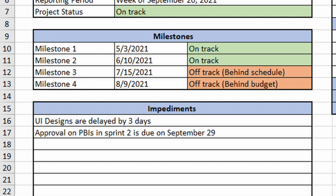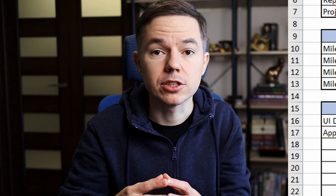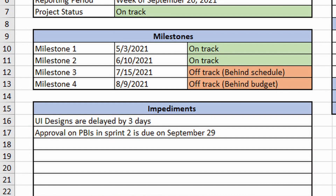The next section is the milestone section. Here you'll have the name of a milestone, the due date, and again the status of progress towards that milestone. You actually want to manage your projects as a series of sub-projects, trying to be on time for one milestone at a time. The important thing is to ensure that your milestones are tied to deliverables or work packages, so clients know what to expect at a given date. If milestone one is on track, it means all deliverables under that milestone are on track.